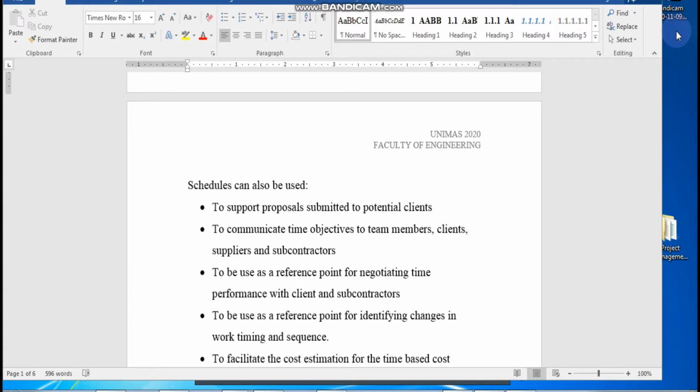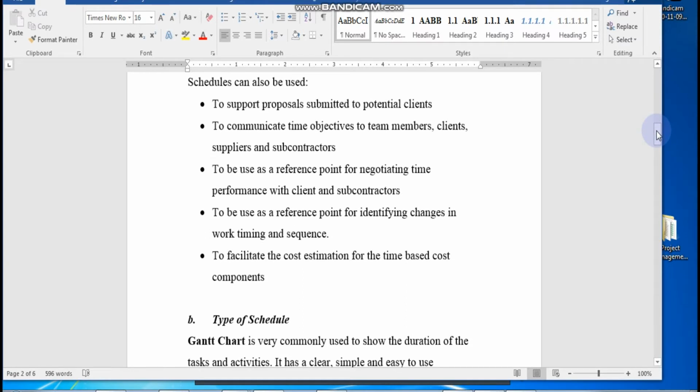You need to point towards that particular bit. It's listed down in that schedule that there's a delay here. So that delay or that early finishing is the change, and that change has a reference point from our schedule. So scheduling is also a basis for time estimation, cost estimation, and quality estimation. Only with enough time can you do a quality job. If you need to shorten time, you need to have more costs involved. So this will facilitate that relationship between time, cost, and quality. So again, schedule is the first. You need to do scheduling planning first.